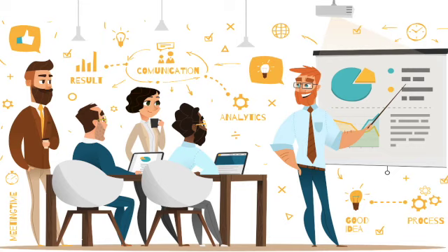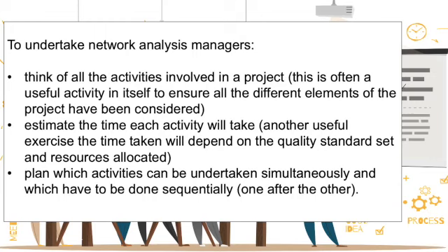So what we are going to be focused on is critical path analysis, which is a particular network, and how to make sure the network is completed, or the path is completed, in the most efficient time. So critical path analysis is a project management tool, and it's used to plan, schedule and control complex projects. It identifies all the activities required to complete a project, it estimates the duration of each activity, and it determines the dependencies between them.